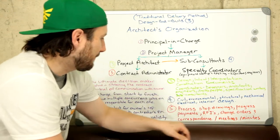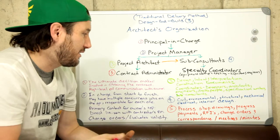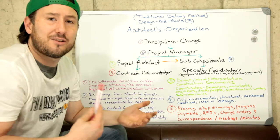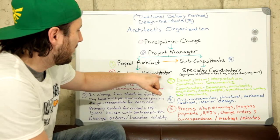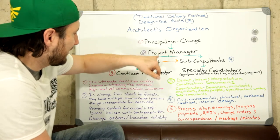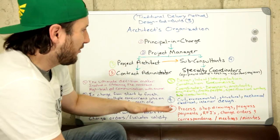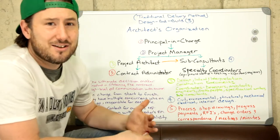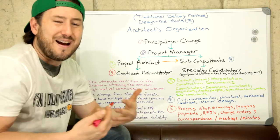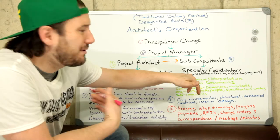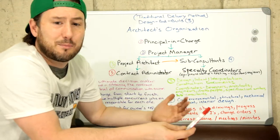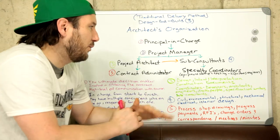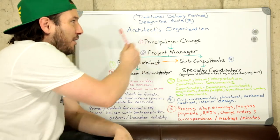The contract administrator processes all the information: shop drawings, progress payments, RFIs, change orders, and records all correspondence for the project. They hold meetings and distribute meeting minutes, staying involved in the day-to-day construction and relaying information up the chain to the project architect. Specialty coordinators include outside inspection agencies, manufacturer representatives for equipment startup and testing, and project engineers or power engineers who program HVAC systems.